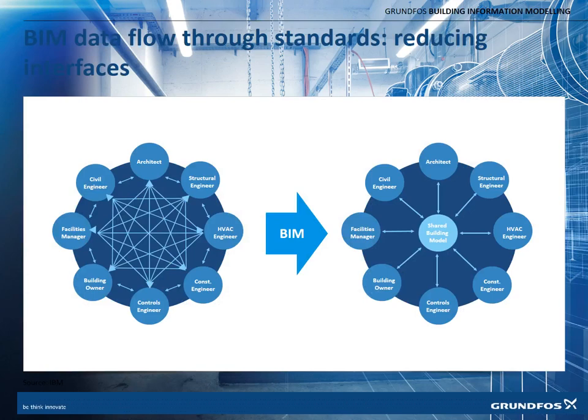If we look at how data flows through a traditional project, you would have all the disciplines — architects, structural, MEP, controls, a building owner — all communicating without being connected. So we really have the spider web. What BIM does is that it facilitates a set of processes where people share and provide information into one model or one repository, so that when an architect changes something on their drawings, it is immediately reflected in the data available to the other parties in the project.